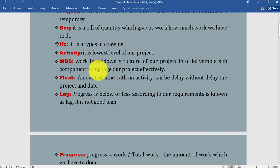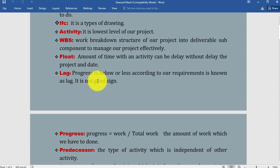Float: Float is basically flexibility—the amount of time an activity can be delayed without delaying the project end date. So float is basically the flexibility in any activity. If we delay the activity, it doesn't affect our project. But the critical activities have zero float, so if we delay the critical activities, our project will be delayed.